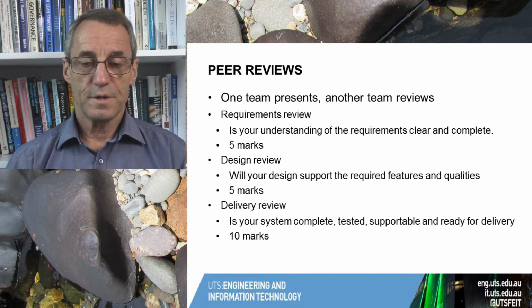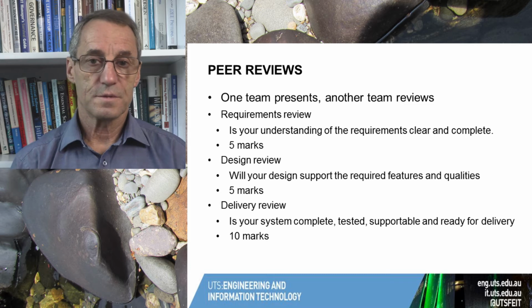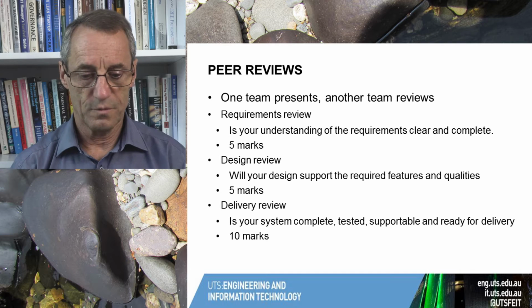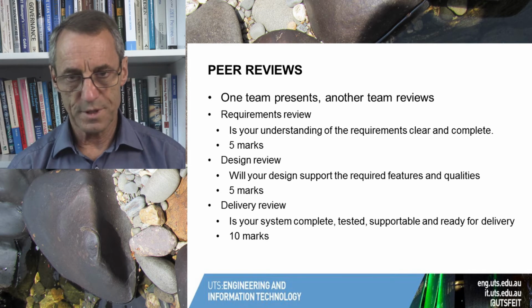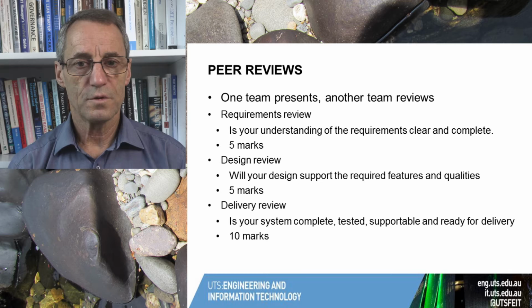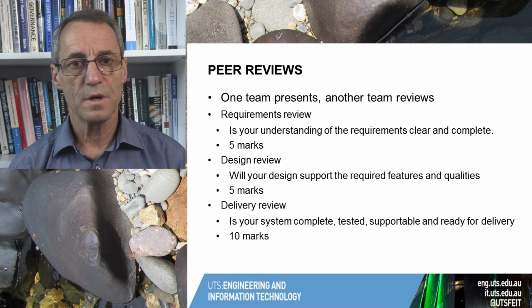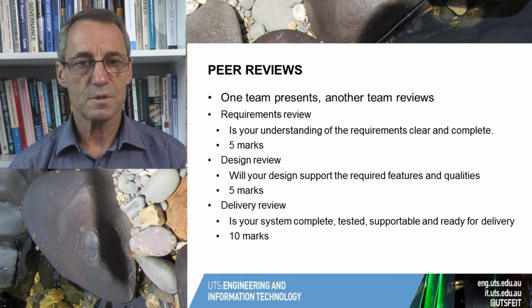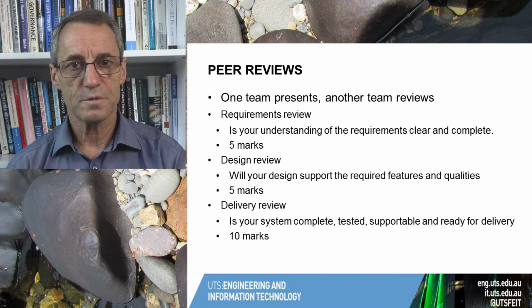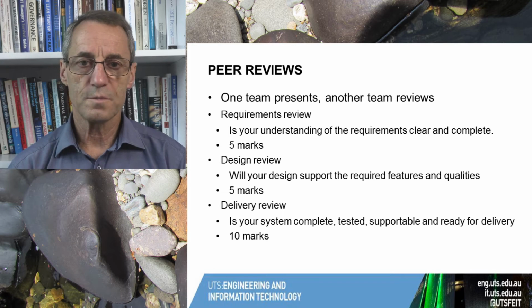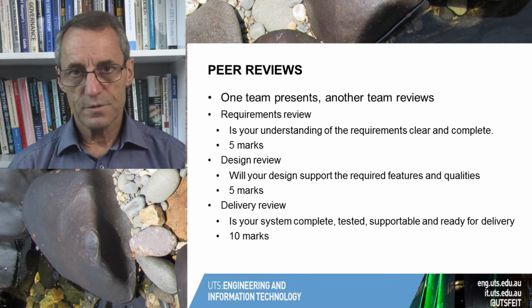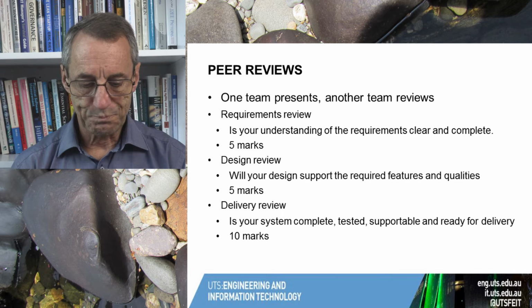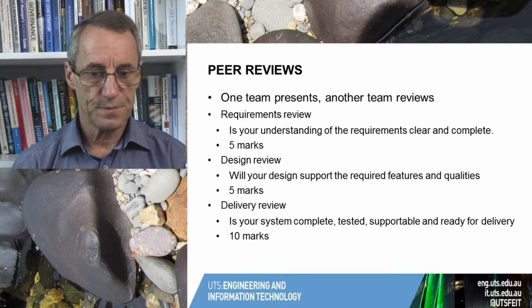The second review is a design review. That is, now we've completed the design, all the elements of the design that are of major interest, and we're presenting that. And the whole idea is to determine whether those designs will support or achieve the requirements. I distinguish there because functional requirements are achieved, non-functional requirements are simply supported. Non-functional requirements are things like performance and security and testability, things like that. So that's the design review.